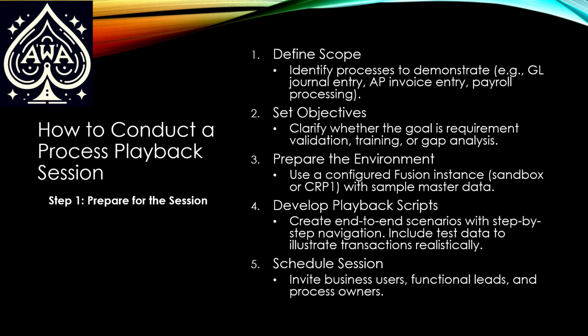You also in there want to include the test data. Don't pick a supplier in the session. There's nothing worse than picking something that you haven't tested. I think I mentioned in the last session we had: use Bob Supplier. Use Bob Supplier for everything. Use Bob Supplier for $1,000, and I know that I'm matching to this purchase order. It's always going to be this purchase order.